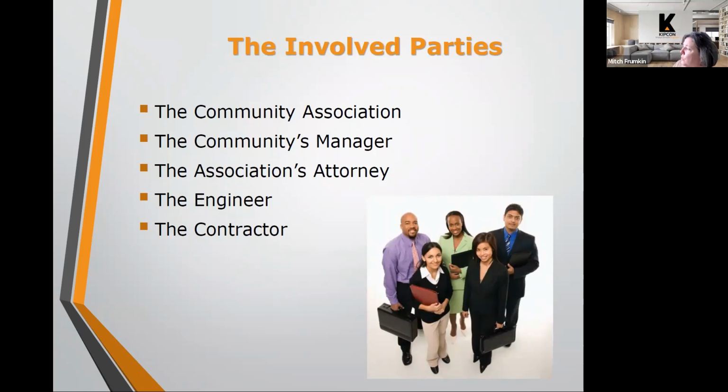So let's talk about who is involved in a remedial project. There's several players here. So the community association obviously is the owner. They own the community, and they'll receive the benefit from the work. The community manager is often the representative for the community association. Sometimes we deal directly with the board president or the board members, but there's oftentimes a community manager who is the owner's representative, both to the engineer and to the contractor.